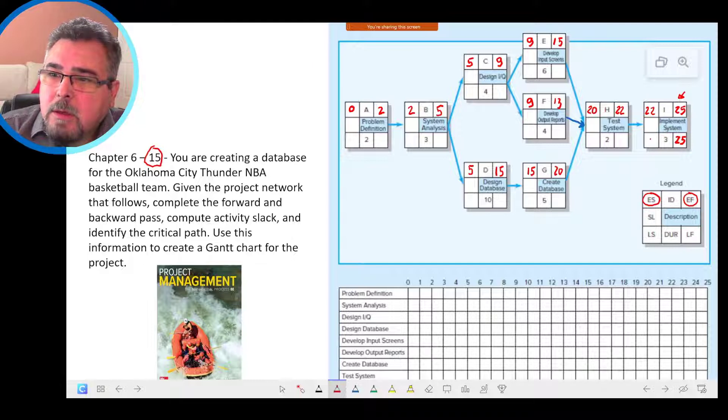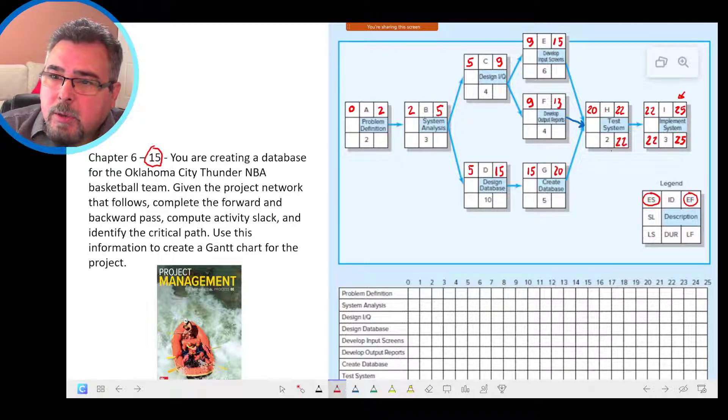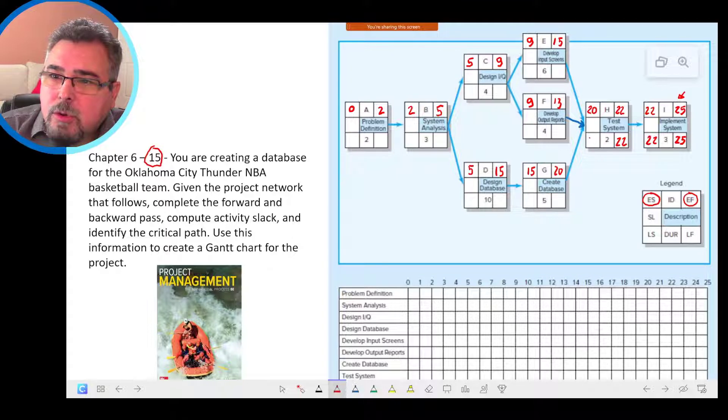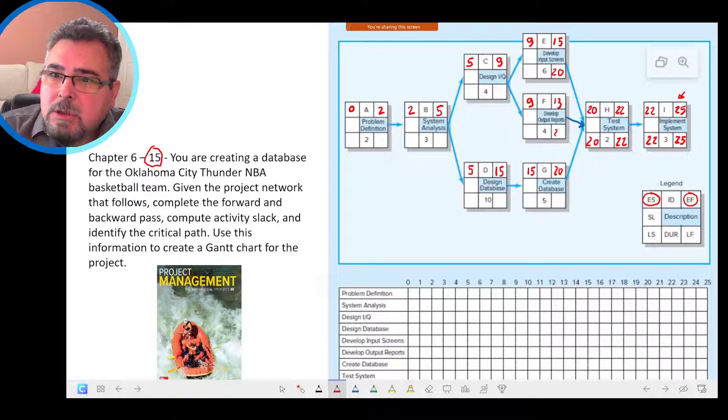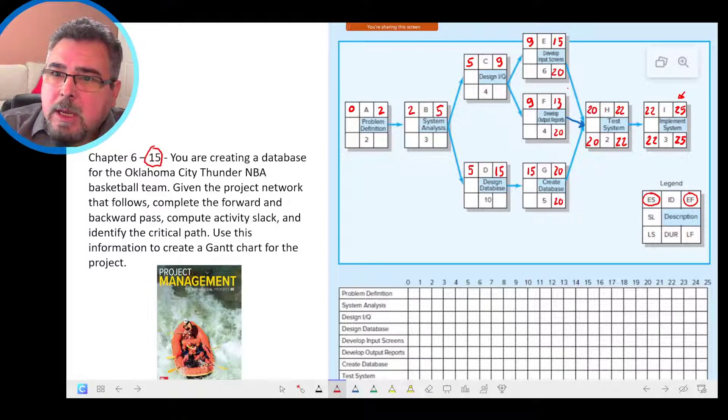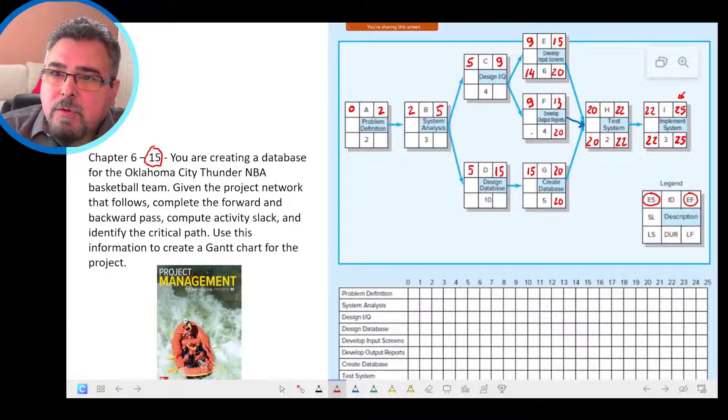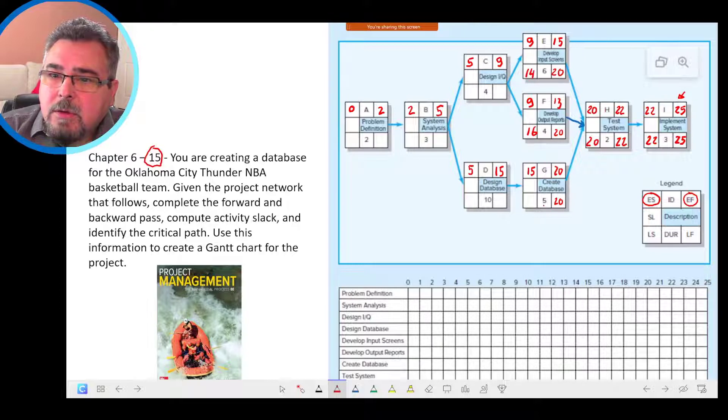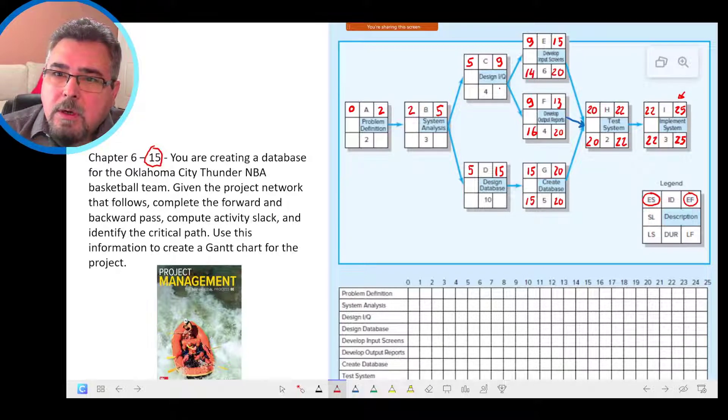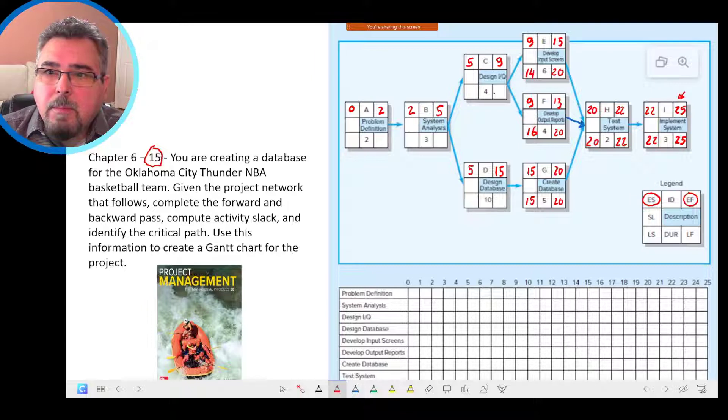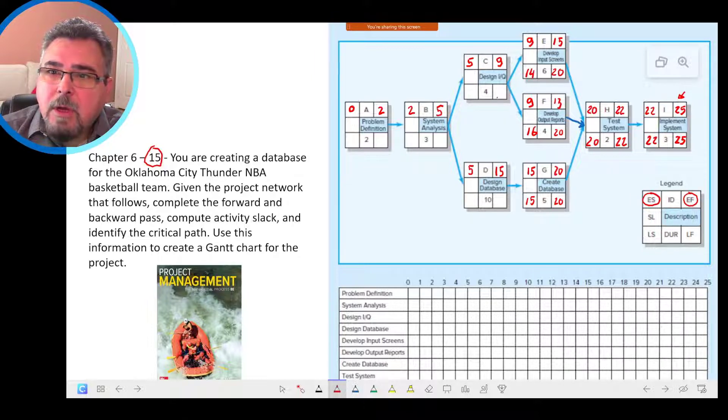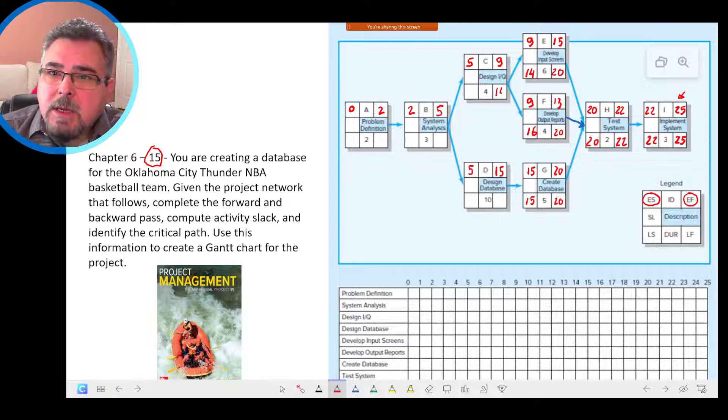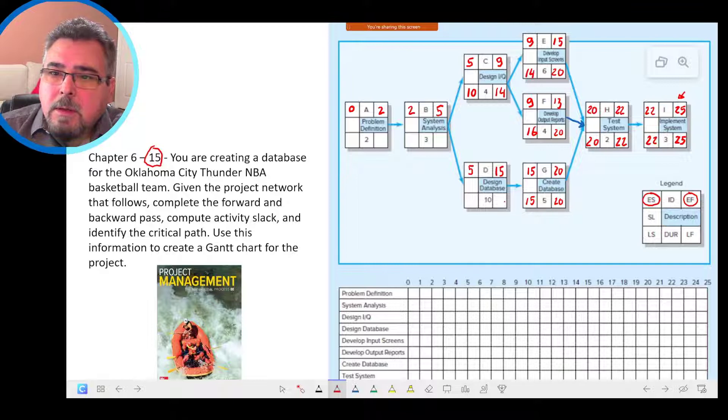25 minus 3, 22. We move 22 here. 22 minus 2, 20. Then we move 20 to the predecessors. Then 20 minus 6, 14. 20 minus 4, 16. 20 minus 5, 15. Now we have another burst activity in the backward path. We have 14 from E, 16 from F. We take the lowest because it's the backward path. 14 minus 4, 10.